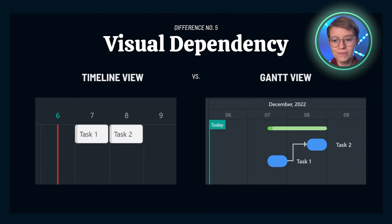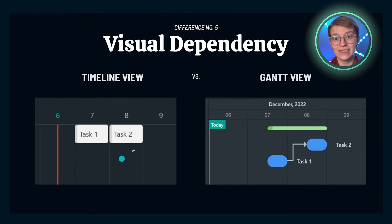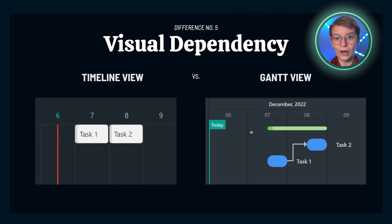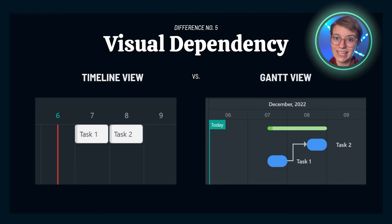Speaking of Gantt view, there's another category to highlight: their visualization of dependencies. When you are in timeline view and you have tasks that are dependent on one another, you've got no idea — no indication that they are dependent, not even a little yellow symbol, nothing. Meanwhile, in Gantt view, it could not be clearer that there is a dependency relationship between two pieces, thanks to the big gray arrow connecting them. If you need to visualize blocking relationships — this needs to happen before this — you're going to find Gantt view more powerful.